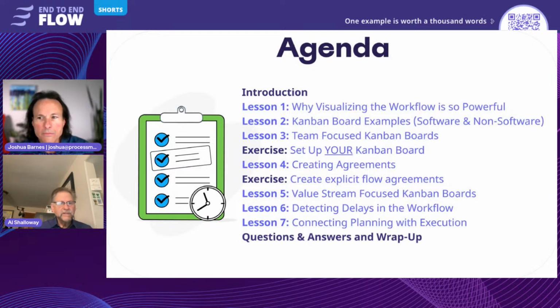And part of that is communication. One thing I hadn't mentioned about why you want to focus on finishing, first of all, it's easier, but think of this. I'm a person, I've just finished something, and if I'm doing WIP limits, I could pull, but that's all about me. When you say, what else can I finish? I look around me, at the people on the team with me. It creates collaboration. It lowers the delays between the steps and the people interacting with each other.